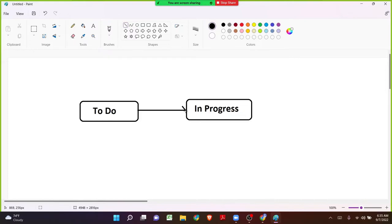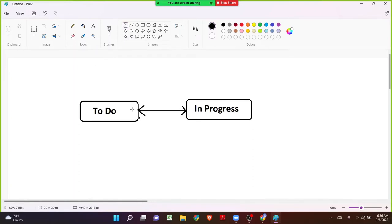If we see an arrow in one direction, anyone can move the issue from To Do to In Progress, but from In Progress they cannot move the issue back to To Do because there is no transition from In Progress back to To Do. In Jira we can make use of bidirectional transitions — from In Progress we can drag and drop the transition back to To Do so that the user can go back and forth.